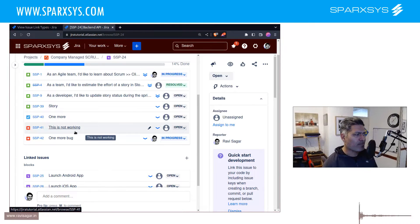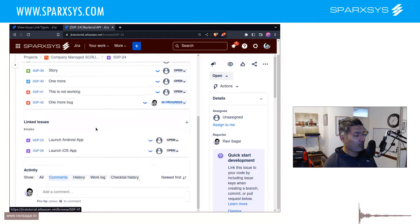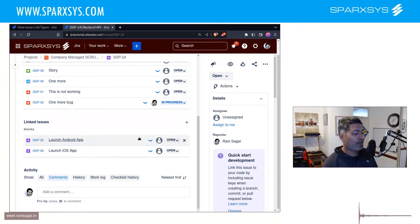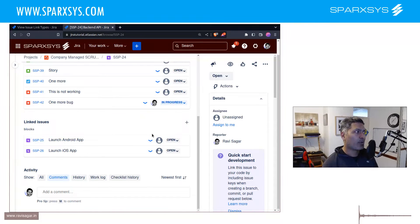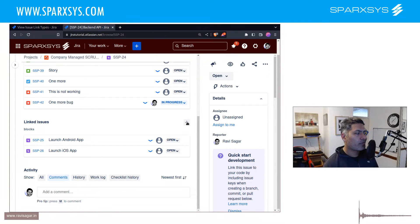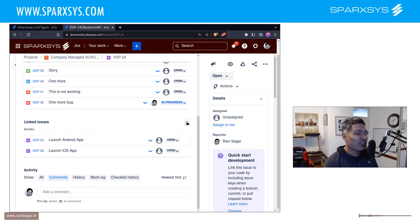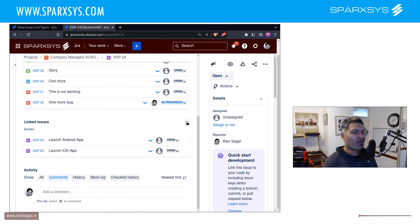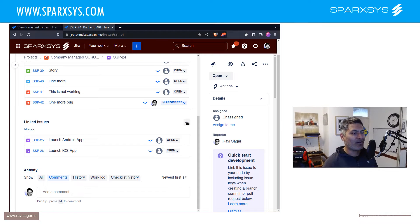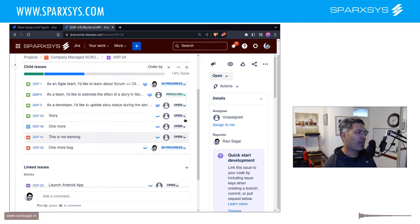You can of course have this parent link field to use basically stories under an epic or epic under let's say a feature if you're using advanced roadmaps. But the thing is that it can be a bit confusing sometimes, and a bit more confusing to be honest, because you can always use issue linking which is absolutely different from using the parent-child relationship using the parent link field.